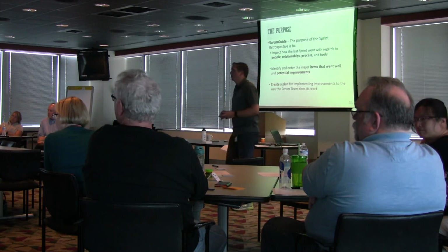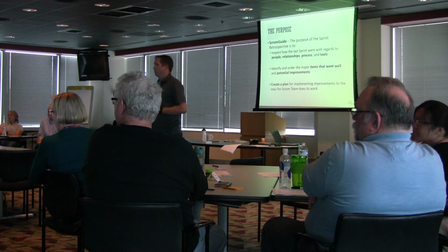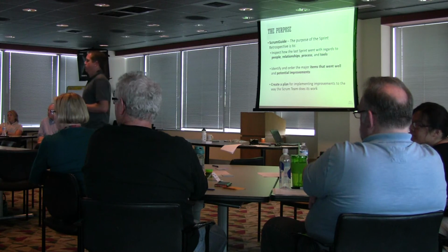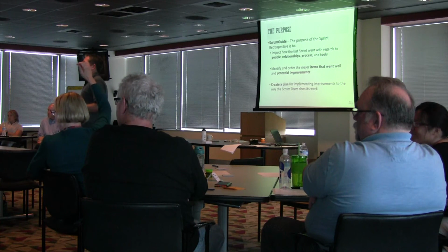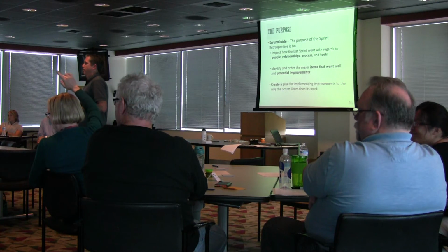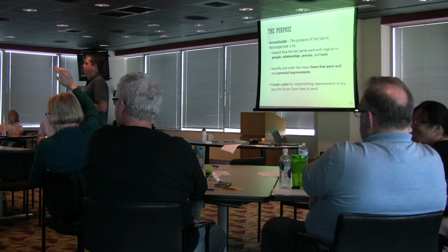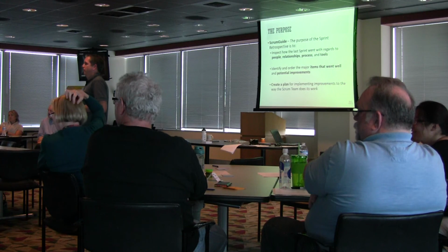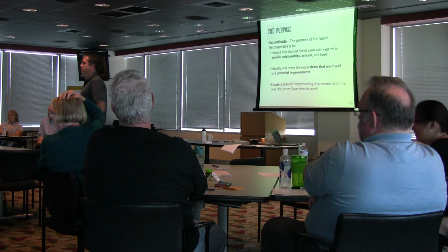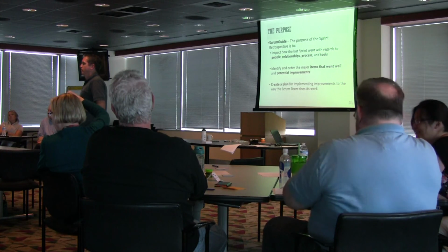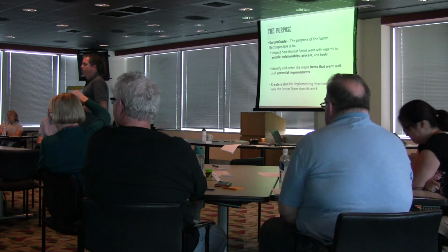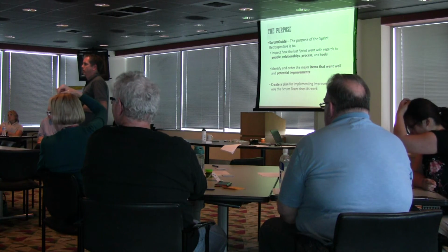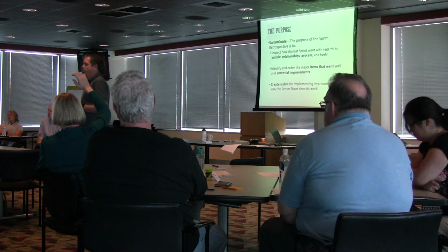My problem is we do that, and I challenge them every time. We're committing to those, and when we come back in the same retrospective, we either have to check the box that says we did or didn't, and we don't check the box because we forgot about that. The suggestion to fix that is to actually create the PBI that sits in your spreadsheet. But no matter what team I've been on, we've always struggled with it. We leave here with a plan, we're gonna be awesome for the next 2 weeks, we're gonna do these 2 things, and we come back and, dang it, we forgot to do them, or we didn't have a chance.